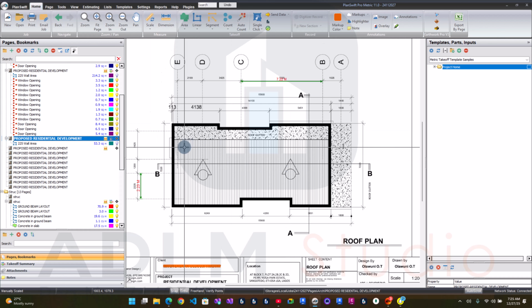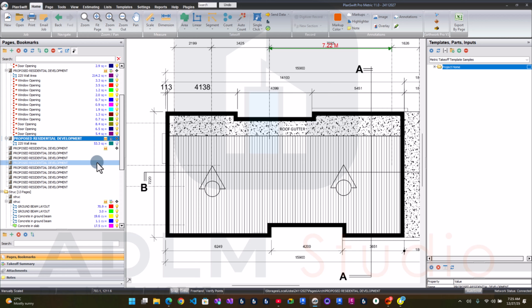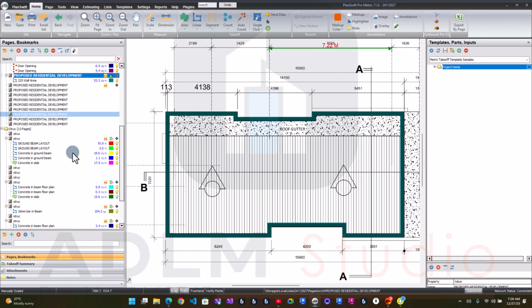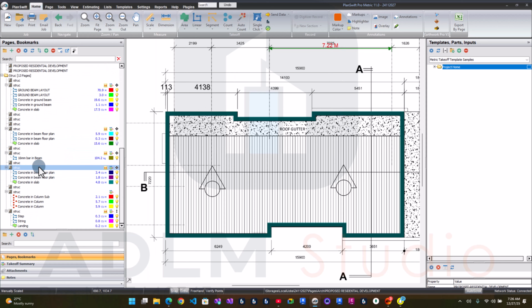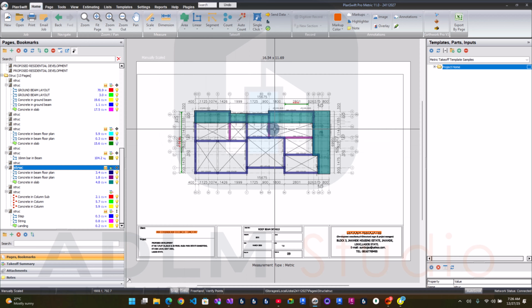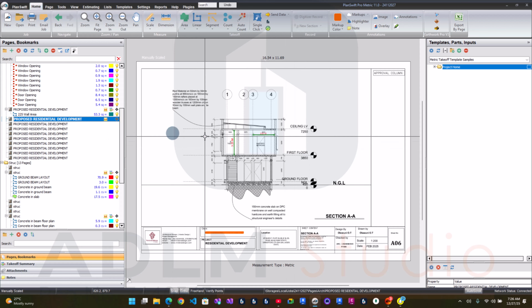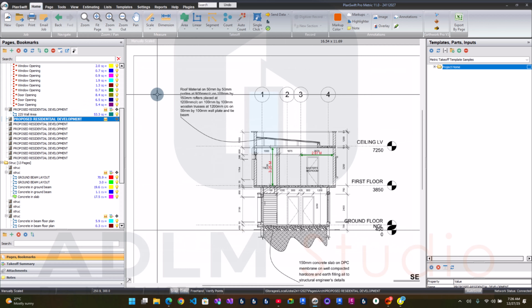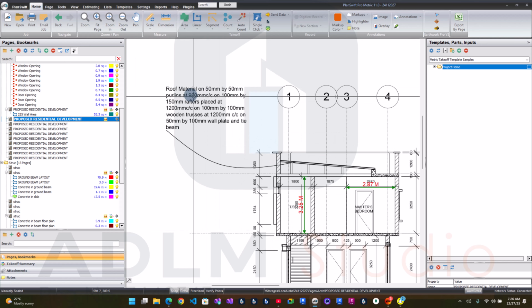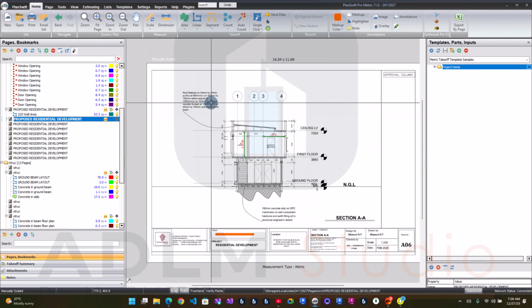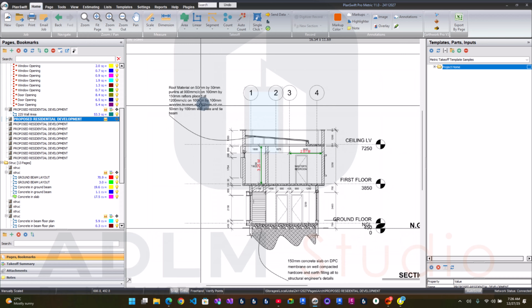So we'll pick things up by doing our roof measurement in here. We measured for our roof wall. We measured for the roof slab also, and the roof beam in the structural drawing. So it's just the roof covering that we are measuring in this episode. The show details shows a standard spacing of 900 purlin, 150 mm rafters. So it's just the size of the rafters, the standard spacing and all of that.